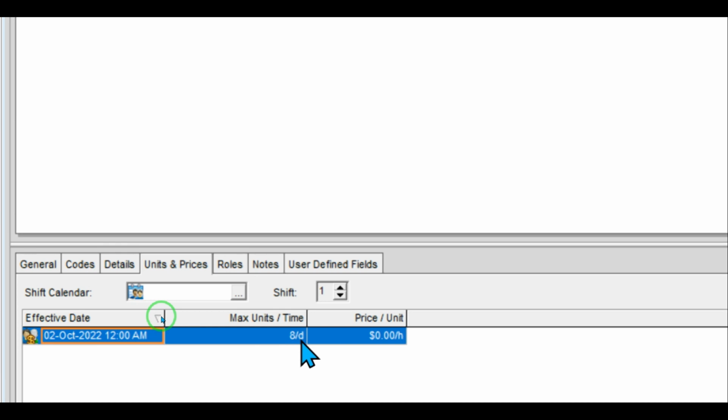However, after planning, if we see we need more than this capacity, we will change the max units. So now we do not change it and we put it on the minimum possibility that we can have for these resources. In the next step, we have the price per unit for our resources.